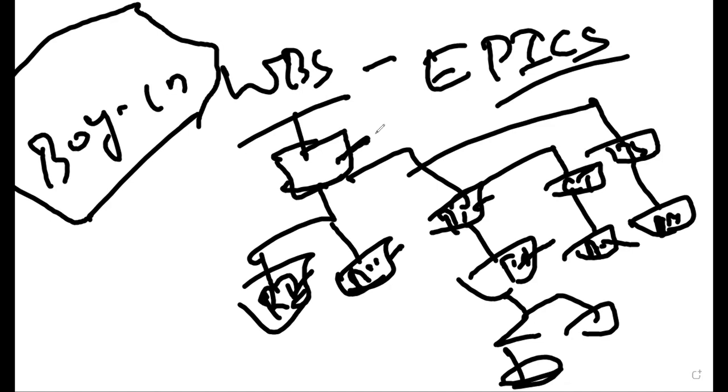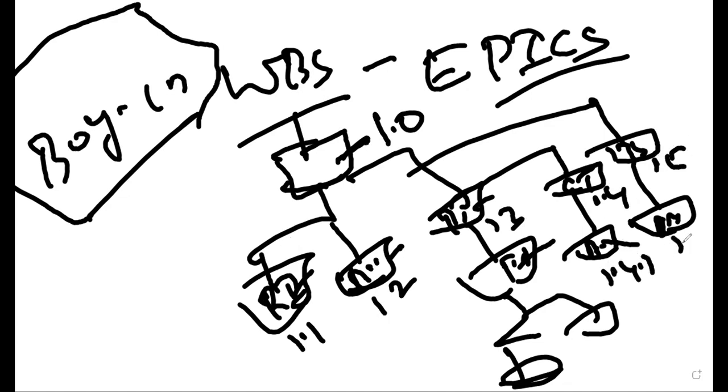So this is a major WBS component. We can give the ID 1.0. So it's coming from the same component, so we can keep this one as 1.1, 1.2, 1.3, 1.4, 1.5. And here it is 1.4.1, 1.5.1. Right or not, guys?